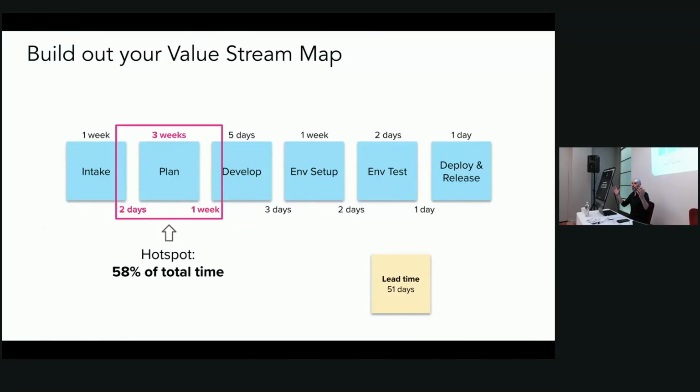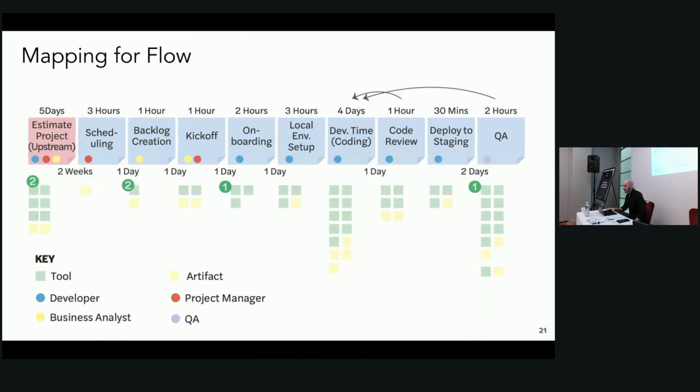So we can use this to understand what is lead time. This is an indication of lead time. It doesn't have to be perfect, doesn't have to be precise. The only thing that matters is that we have a focal point that has some data behind it that we can chase with high confidence that we have something of value to pursue. And then the wait time we can understand as a ratio of the lead time. Often these are actually reversed. You usually have way more wait time than you do actual active time in the value stream, especially if there's a lot of handoffs.